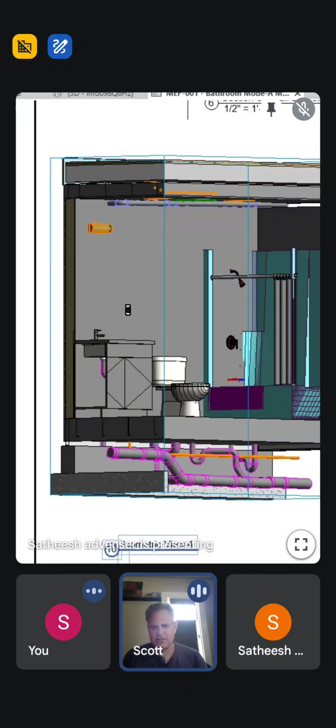Yeah. He needs to see all the appliances that we're using, all the fixtures that we're using, electrical fixtures, and like anything that he's plugging in, he needs to have a spec on it. Yep. And we should actually have a spec book. And as they're starting to detail things, instead of saying WC1, it could actually be a number that refers back to the spec book. And then as we start to change the fixtures, we can update specs accordingly. It'll just take a little bit to get kind of organized. Everything is there. It's just incredible.